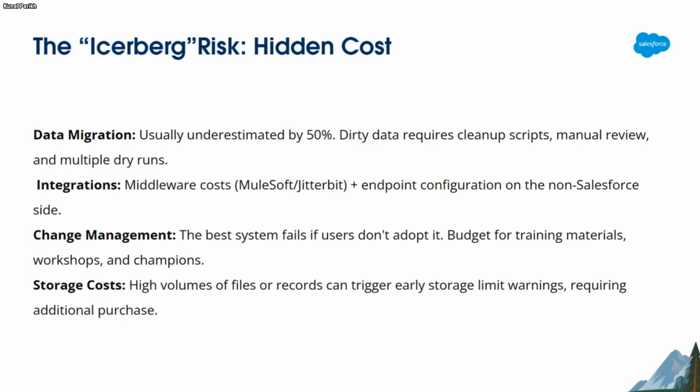Is there storage? In the case of Salesforce, normally storage doesn't come from the partner side. Typically, it's all on the cloud. But have you factored in a high amount of data when you are doing your Marketing Cloud sizing or your Intelligence sizing? Intelligence works purely on the number of rows that you're going to use for your reporting, basis which you identify the cost. So have you identified the correct number of rows? For Data Cloud, have you identified the correct amount of data? What is the storage cost going to be?